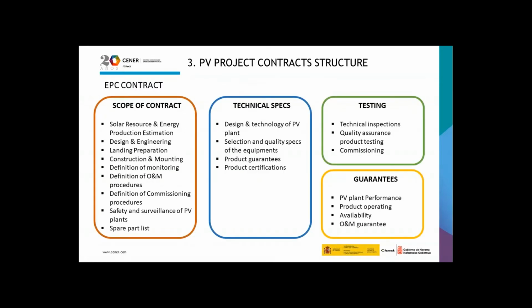The EPC contract, engineering, procurement, and construction contracts are the most common form of contracts used to undertake construction works by the private sector on large scale and complex infrastructure projects. Under an EPC contract, a contractor is obliged to deliver a complete facility to a developer who needs only turn a key to start operating the facility. Hence, EPC contracts are sometimes called turnkey construction contracts.